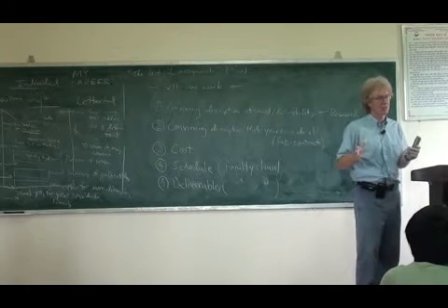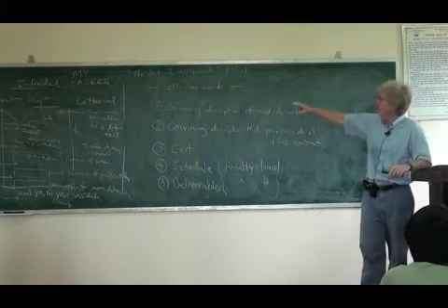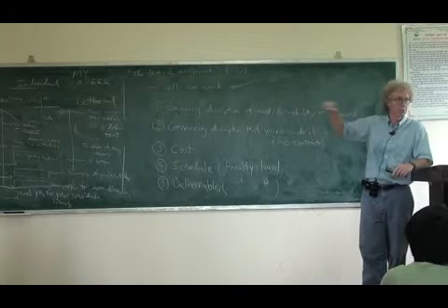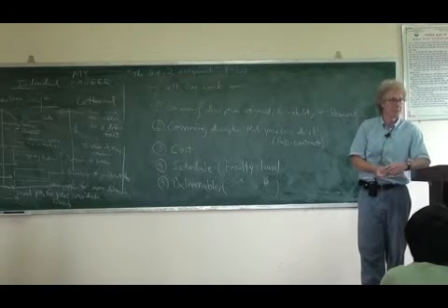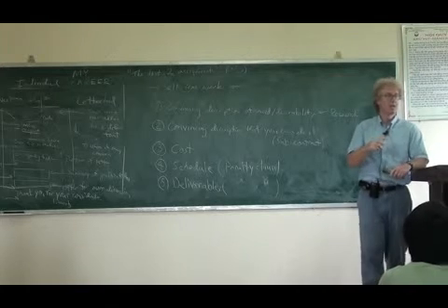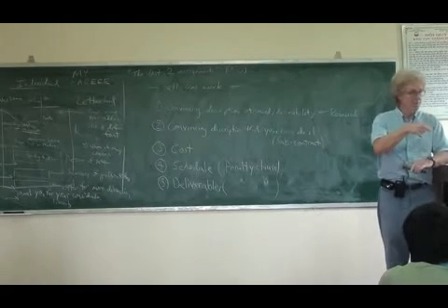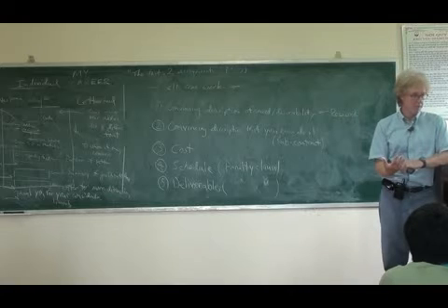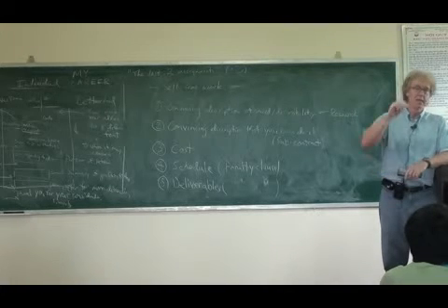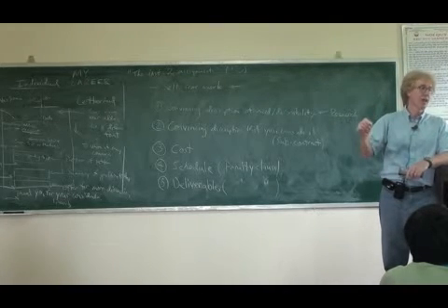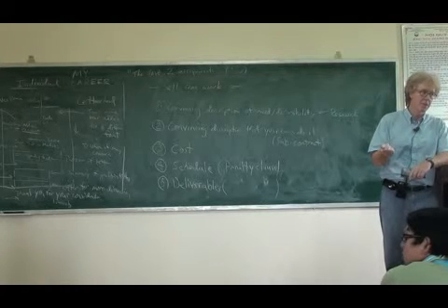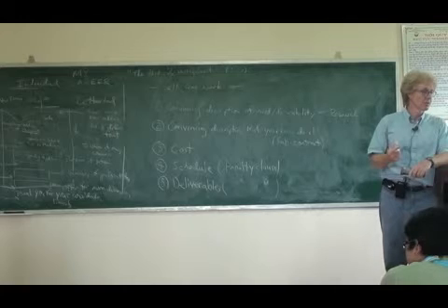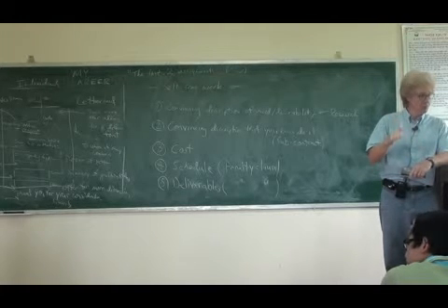How is your company going to stay in business? You're going to stay in business by selling your work. So you send me a proposal to keep your company in business for at least 6 months. It has to have enough money in it for 6 months. So that means the cost of your company will be the salaries for 5 people for 6 months, the additional cost of having employees for 6 months, like maybe there are taxes you have to pay the government, maybe you have to buy health insurance, whatever it is, all those costs.